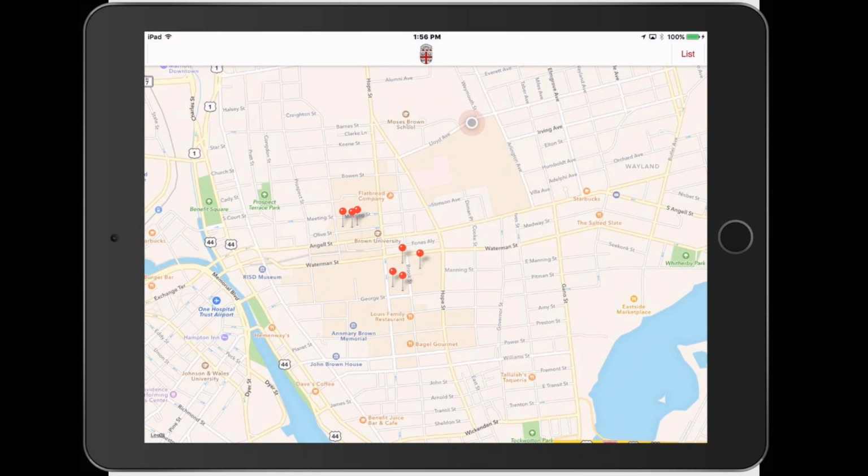And who updates those? Who's maintaining that information? So we had contracted out with an engineer that we work a lot with that does a lot of our commissioning, and they will continue to do a lot of our commissioning as well. But the maintenance of it now, just at the beginning of any new project, when we deliver, here's our current BIM model, or here's our best set of drawings and manuals that we have, part of that will be delivering, here's our current system manual. And if you alter anything in it, you update that and deliver it back to us.